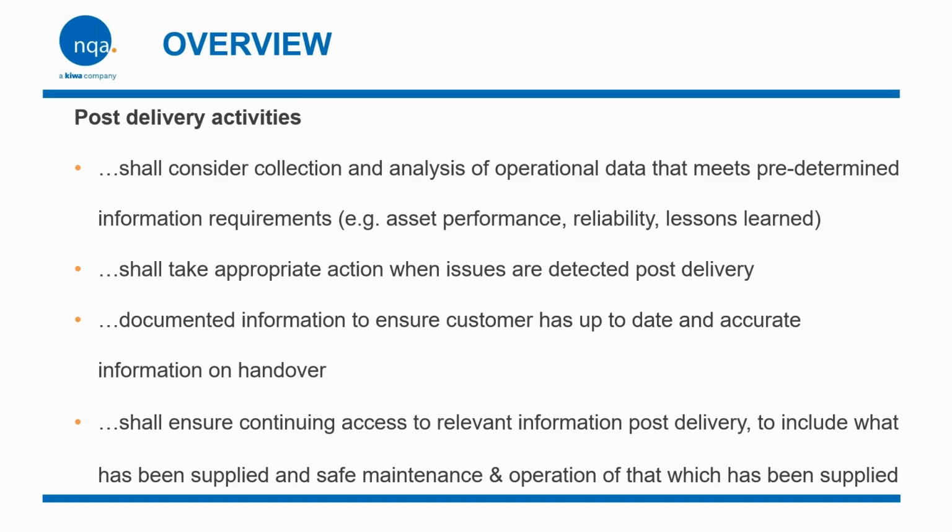Post-delivery activities. You shall consider collection and analysis of operational data that meets predetermined information requirements. You shall take appropriate action when issues are detected post-delivery. Documented information to ensure the customer has up-to-date and accurate information on handover. You shall ensure continued access to relevant information post-delivery, to include what has been supplied and safely maintaining the operation of what has been supplied. Post-delivery activities focus on monitoring, responding to issues, and ensuring customers are supported with accurate information, all of which is critical to sustaining asset value, keeping it safe, and maintaining clients' trust beyond project completion.